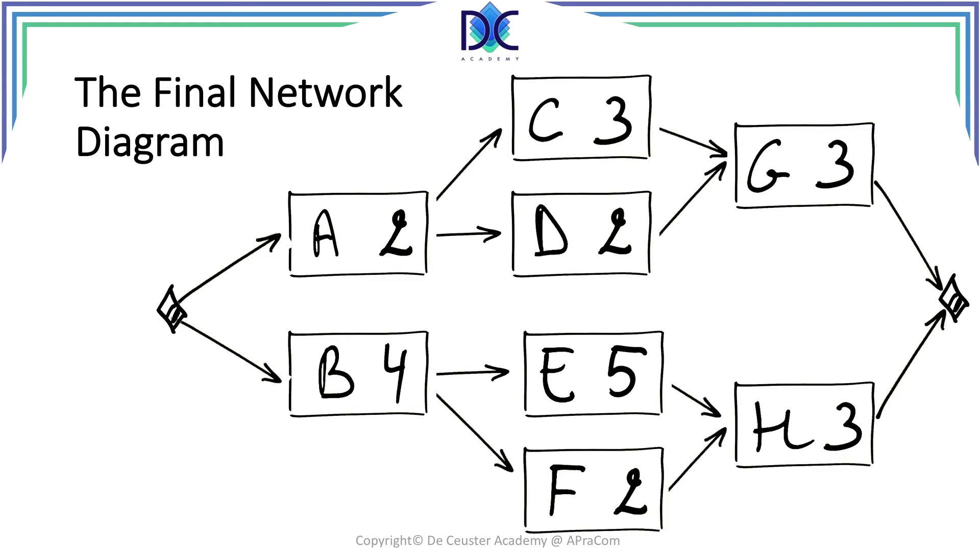The final network diagram looks like this. We have the start milestone. We have the tasks in the order, taking into account the precedence information, and we have the finishing milestone.